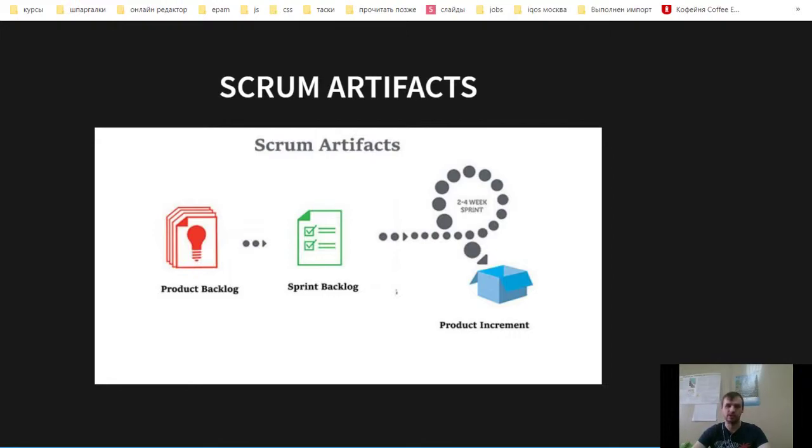The sprint backlog is a list of all items from the product backlog to be worked on during a sprint. This list is put together by prioritizing items from the product backlog until the team feels they've reached their capacity for the sprint.